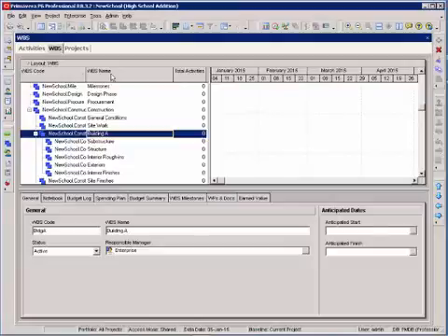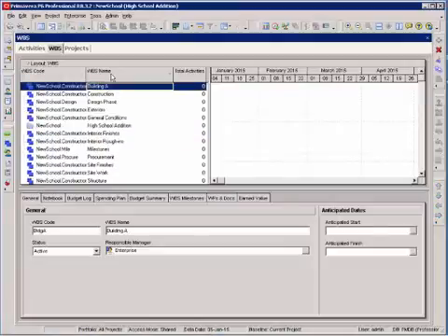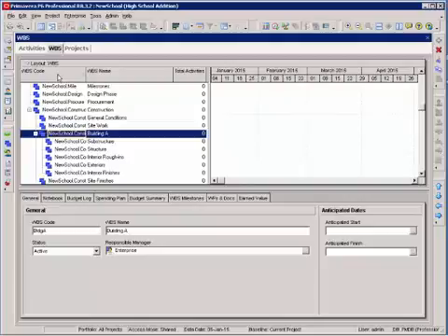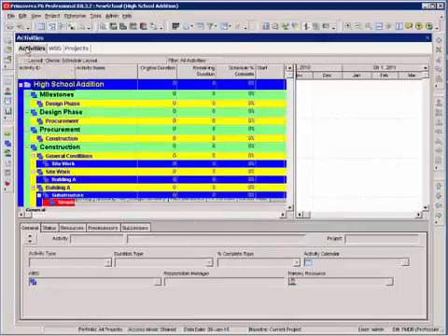This usually comes up in the work breakdown structure. In my classes, someone will accidentally hit a column and will lose their hierarchical view. Since it is hierarchical, I can sort by this column view ascending, descending, and the third option puts it back in that hierarchical view. So if you lose your hierarchical view, you need to select that column heading until the outline shows up again. Now that we've created our work breakdown structure, we can look back at our activity screen.